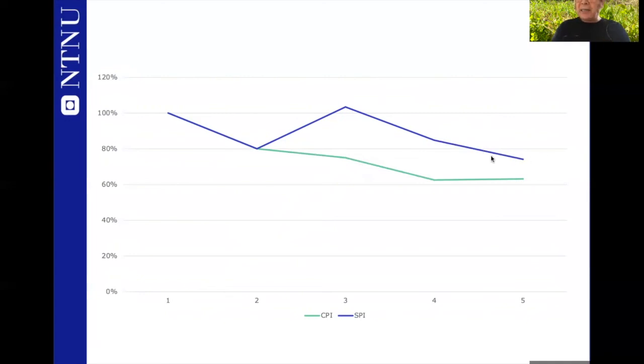So as a project manager, when you look at this data, you need to ask, what shall I do now? What are the measures that I should implement in order to rectify the situation? Obviously, your people are not producing as they were supposed to, and you are behind schedule. So probably you need more resources, probably you need more competent, experienced people, so that they can cover this lag.